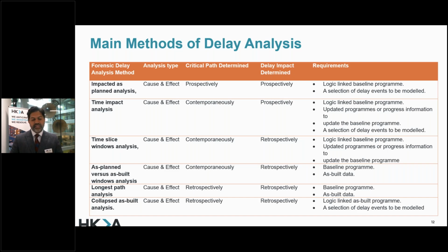Cladding can come afterwards, but it's just a generic discussion that it's a common sense element when we are looking at that. One of the things that we have found, and it's really important to look at when you are conducting your delay analysis, whichever method is being chosen, is that we identify the correct baseline program. We establish a set of as-built and/or progress data, whatever is available, because whichever method you are doing, you need contemporaneous records to determine the critical path or the activity, whether it's site meeting records, whether it's your emails, whatever is happening, you need to look at it.